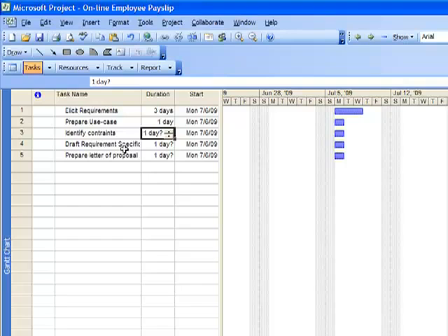Budgets, programming language to be used, and other constraints need 2 days in preparation. We need half a day in preparing our requirement specification and another half day in preparing our letter of proposal. Because other activities will not start unless one activity is completed, we need to assign predecessors to an activity that is dependent on another activity.